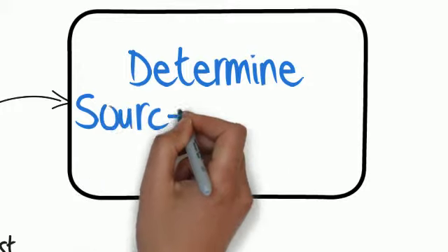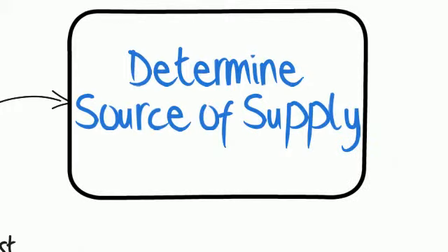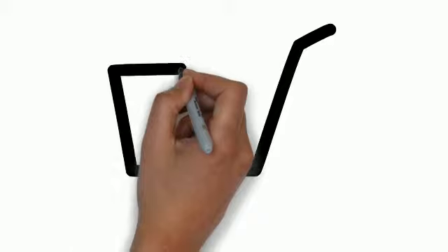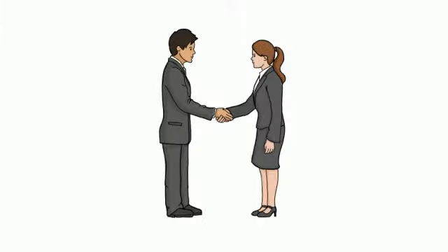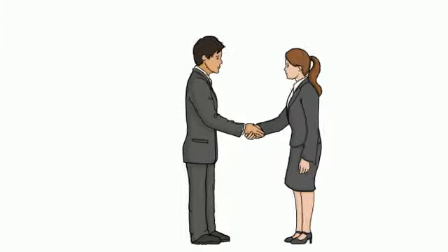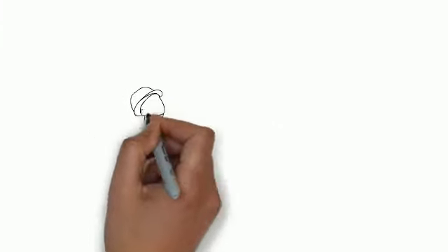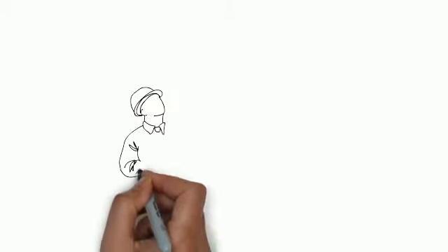Once you have created the purchase requisition, it is routed in SAP to the buyer and supply chain, who determines the source of supply. Supply chain determines if it should be sourced from an existing or a new vendor. The buyer will also determine if an existing contract, a new contract, or a standalone PO are required.